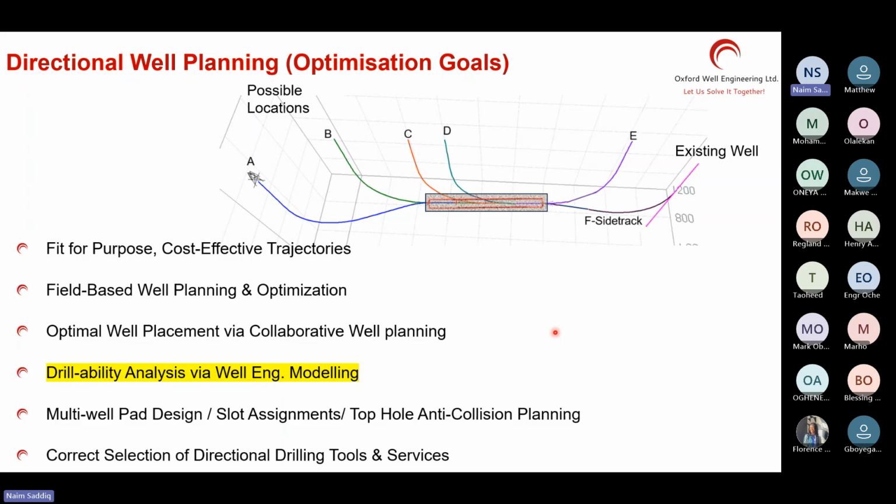So what I wanted to say is there are several ways you can do it. You can ask them what azimuth they would be entering the reservoir with, what their kickoff points are where you can start to build. Are they okay with the turn? You need to ask all these questions because you cannot just get on with it and give them some answer that will be proved wrong later. So you need detailed instruction from them on which locations are no-go.